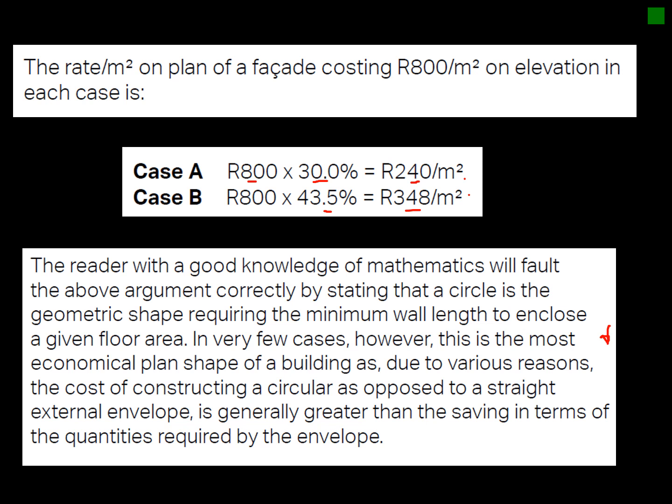The items an estimator typically considers are: what type of brick is used — is it a very expensive brick? Will it be plastered? Is it round? Is it a complex or unconventional shape? Will the contractor actually be able to execute it? Those are the things you consider when building up your rates and doing cost estimation.